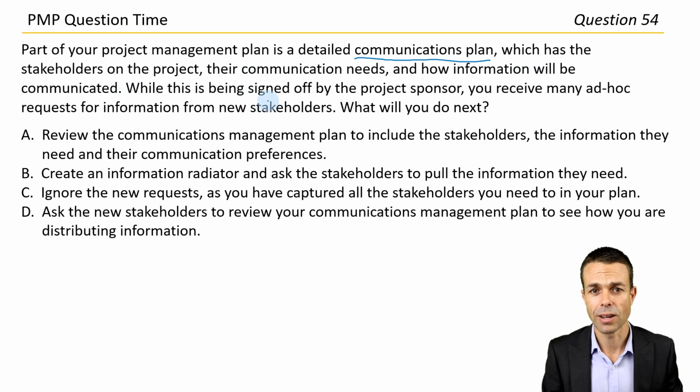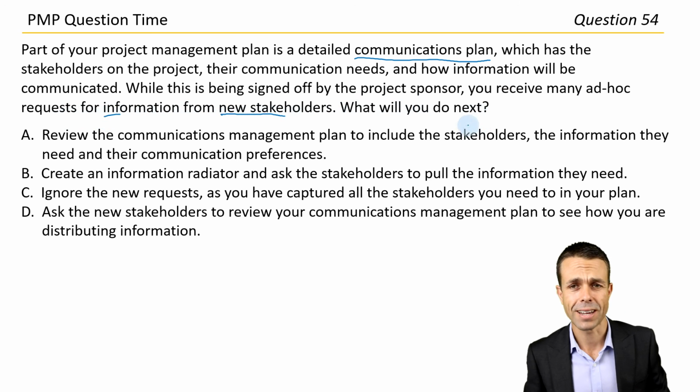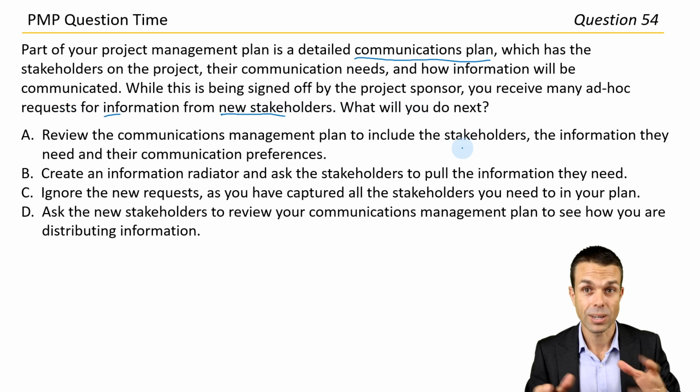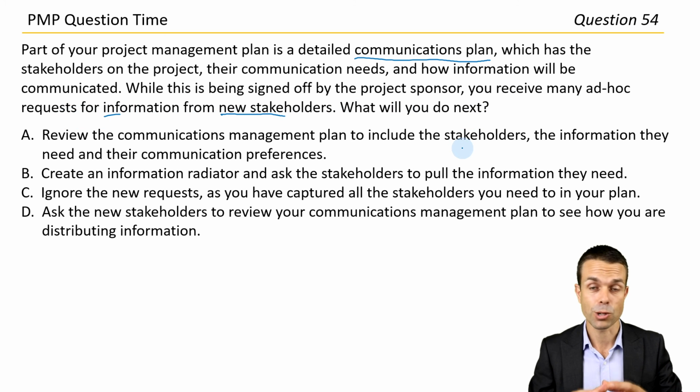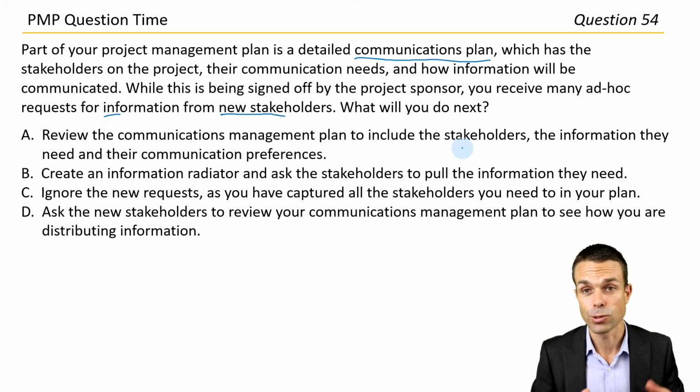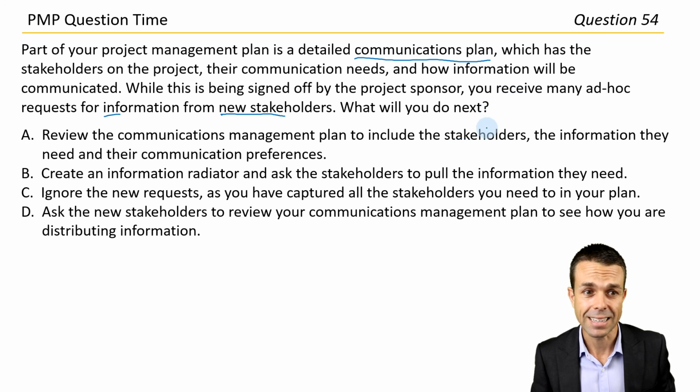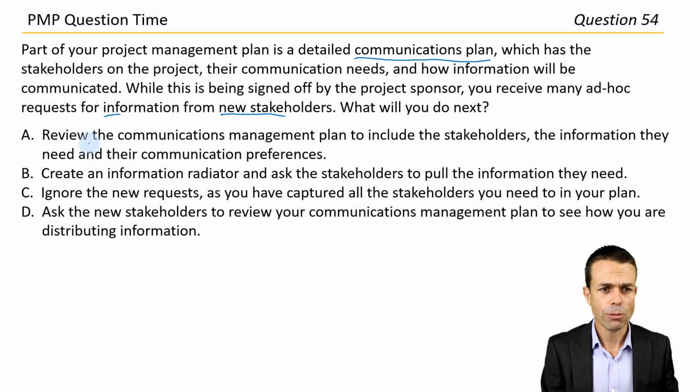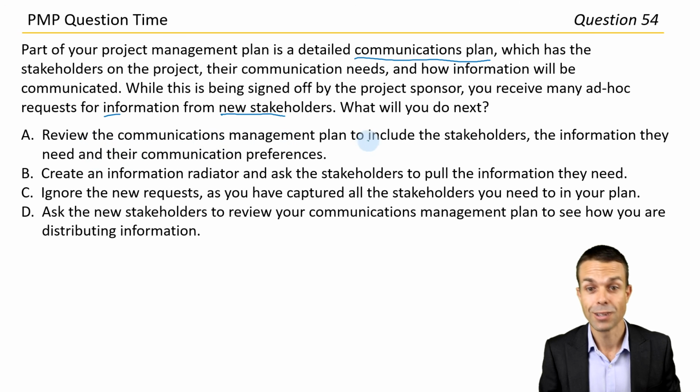While this is being signed off by the project sponsor, you receive many ad hoc requests for information from new stakeholders. What will you do next? So our communication plan, we need to update this and make sure we've got all of the right stakeholders and also what their communication needs are, because they're obviously not getting what they need. So let's see what we've got. Review the communications management plan to include the stakeholders.